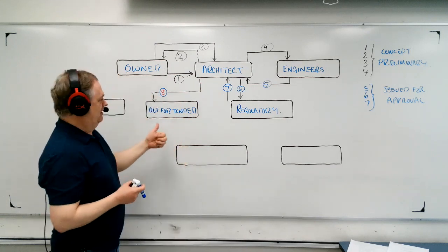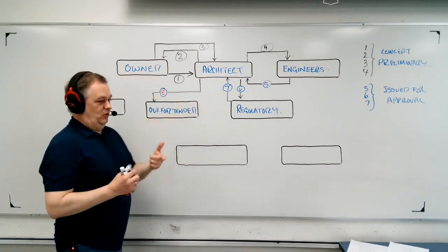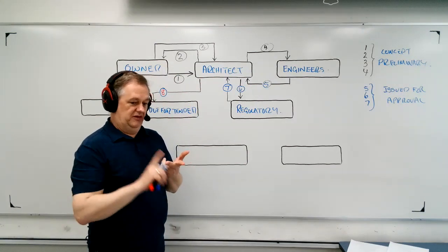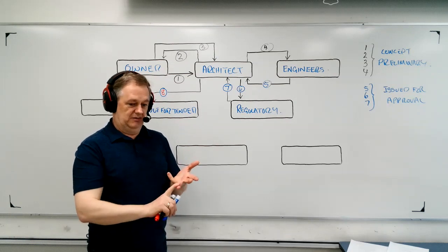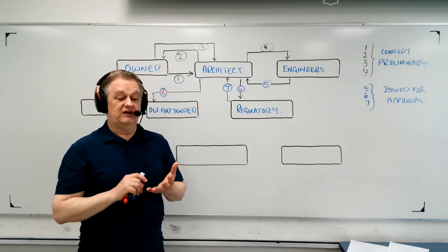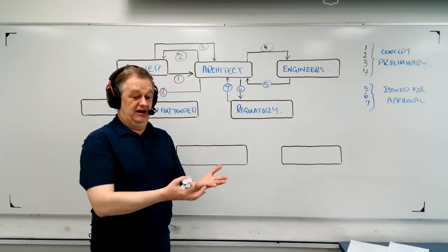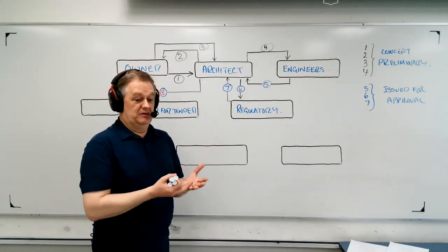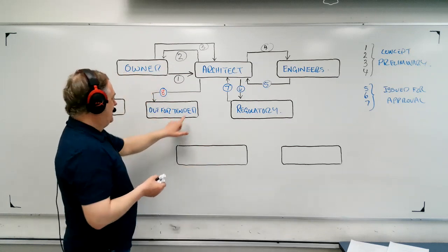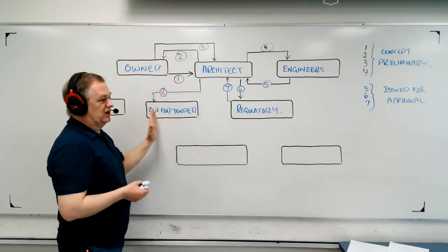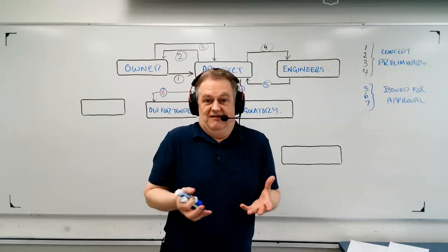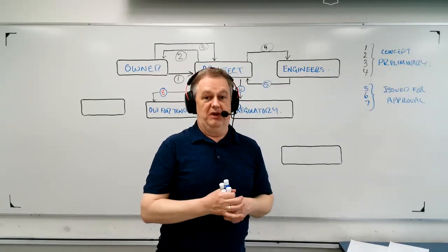because here's what has to happen. The engineers have said, we want this brand of MCC for all the motors. We want this brand of panels. We want this brand of fire alarm system. And all of that is going to be specified in the specifications document, which has now been added to the concept or preliminary drawings and is now part of that package. So they say, okay, who's actually capable of doing this? So the people who are going to bid on it literally have to have connections to be able to do what's stated in the specs.